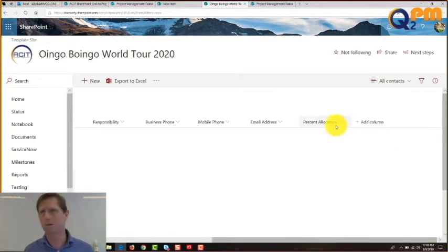What do you think that is? Anybody take a stab at that? Put your PM hat on. It has to do with how much time that particular person is spending on this project. Are they 100% on the project, or do they have other things that they're doing? Exactly. Maybe we've got a graphic designer involved in the project, and she's only available for 25% of her time, right? We have to think about that when we're planning her work, right? That's exactly right.